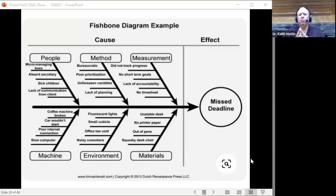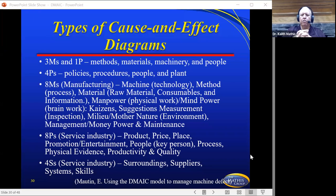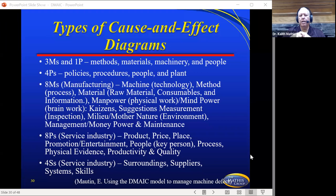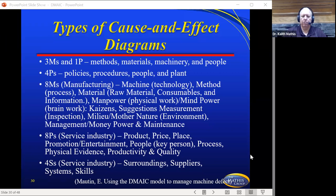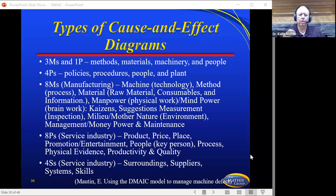A newspaper's main objective is to hit a deadline — they've got content mandated to be out at a particular time, daily, weekly, or monthly. Types of cause and effect diagrams you've probably been exposed to include 3M or 1P — methods, materials, machinery, and people. You could also be exposed to the 4P type — policies, procedures, people, and plant. On the fishbone you put these terms in different quadrants. But you could also make up your own that are real specific for the project — the 8P's, the 4S's of surrounding suppliers, systems, and skills. Whatever makes sense in your culture with your project or organization can definitely be put there.